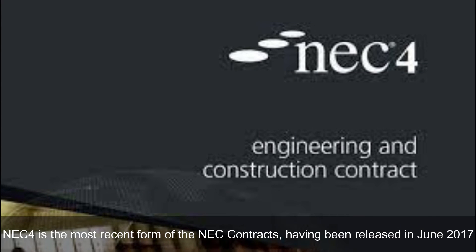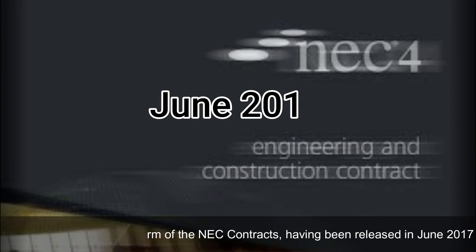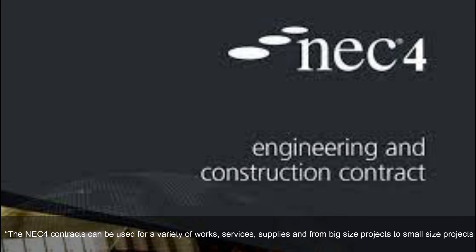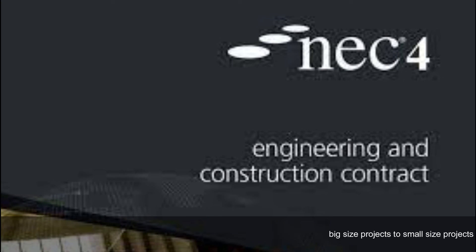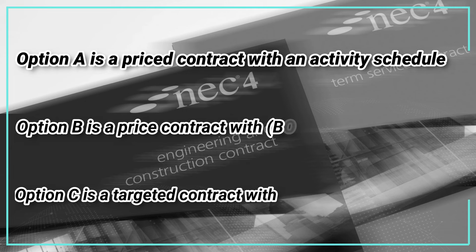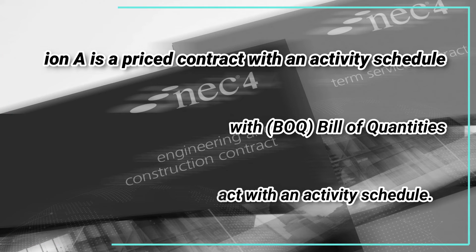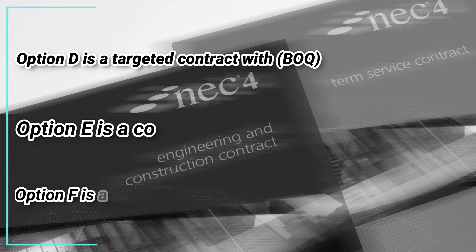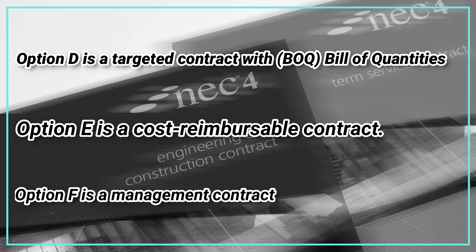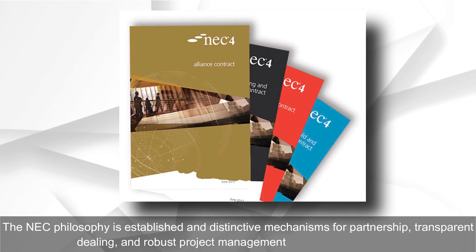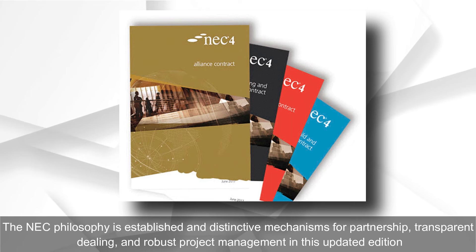NEC 4 contract: NEC 4 is the most recent form of the NEC contracts, released in June 2017. It can be used for a variety of works, services, and supplies, from large to small projects. Option A is a priced contract with an activity schedule; Option B is a priced contract with a bill of quantities; Option C is a targeted contract with an activity schedule; Option D is a targeted contract with a bill of quantities; Option E is a cost-reimbursable contract; Option F is a management contract.